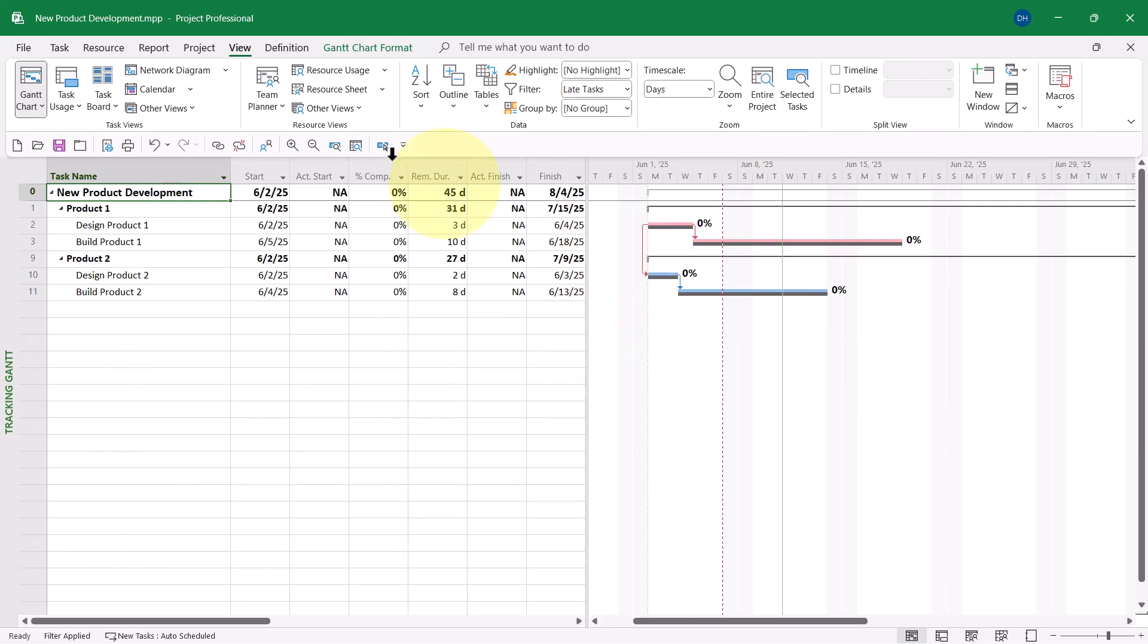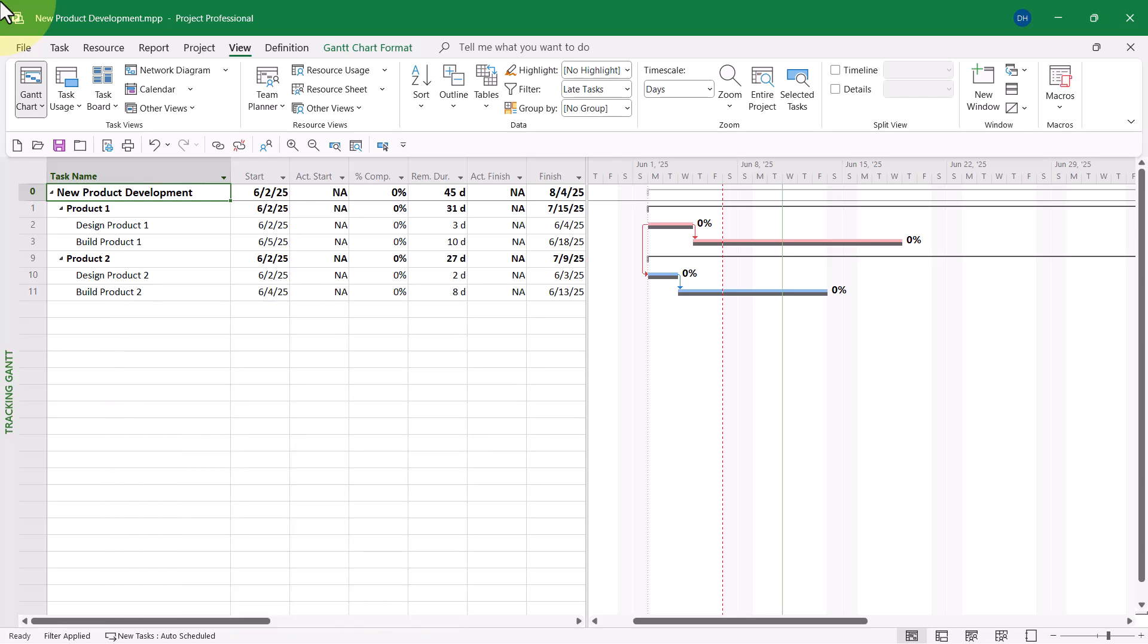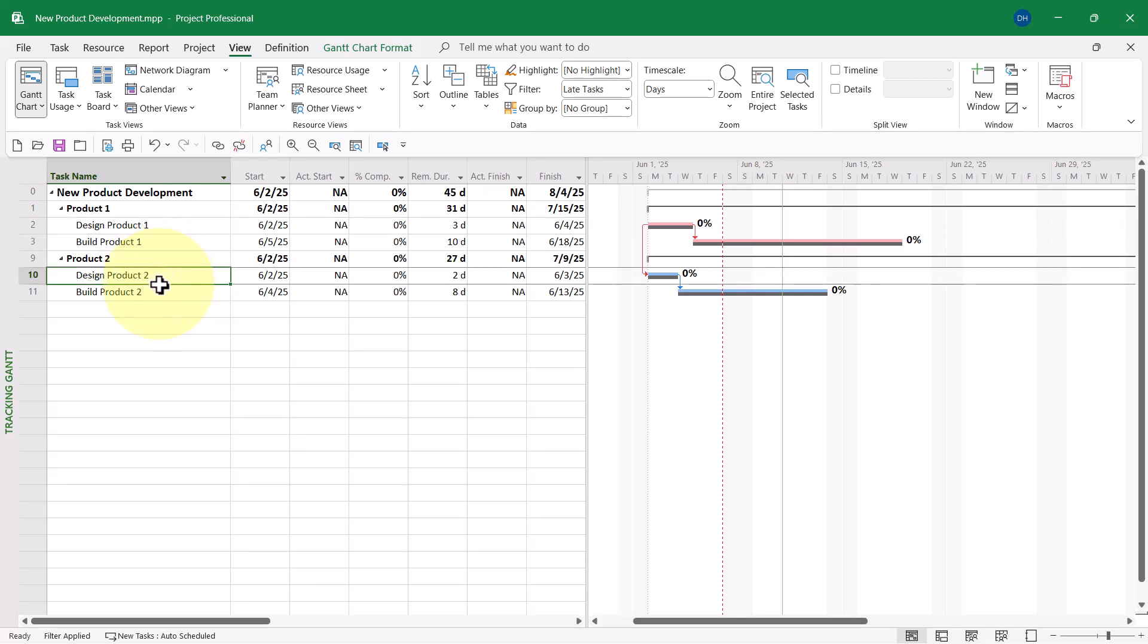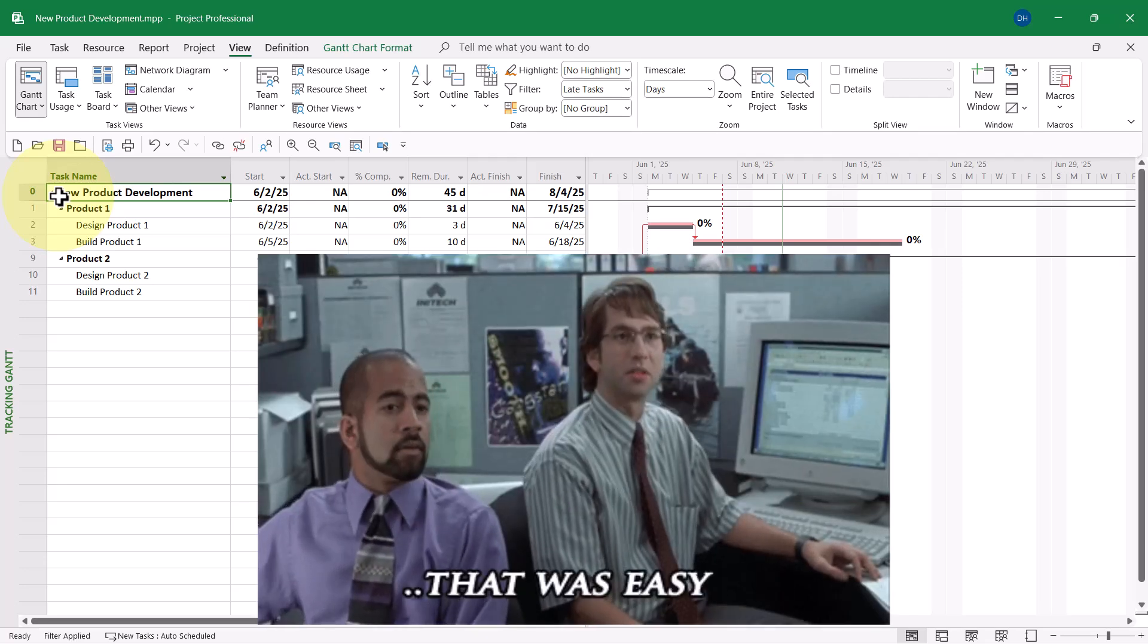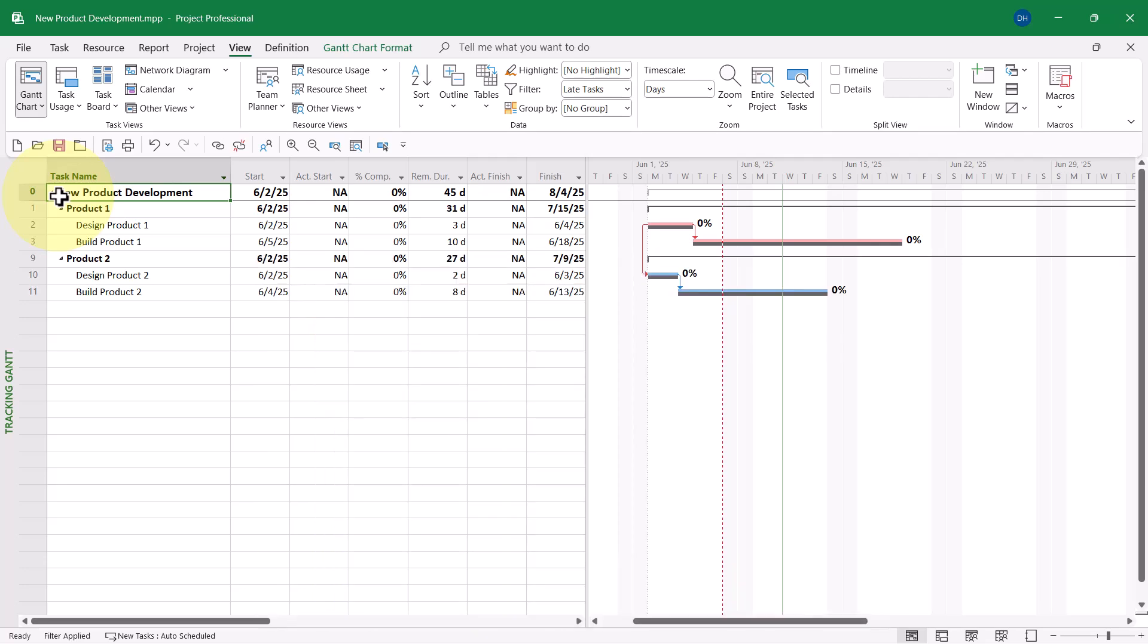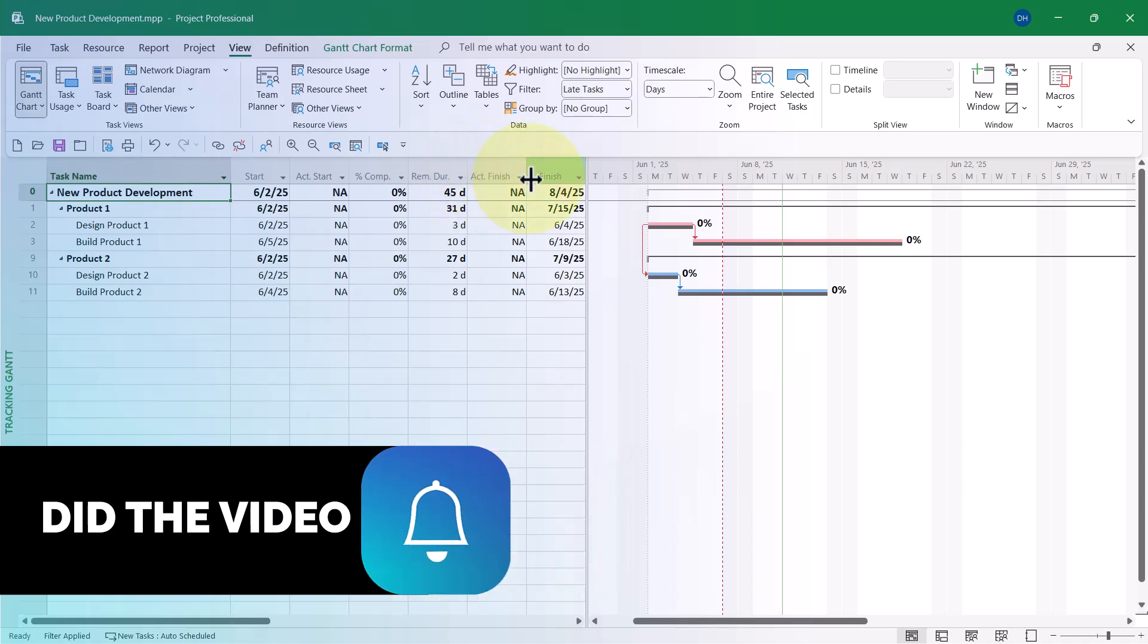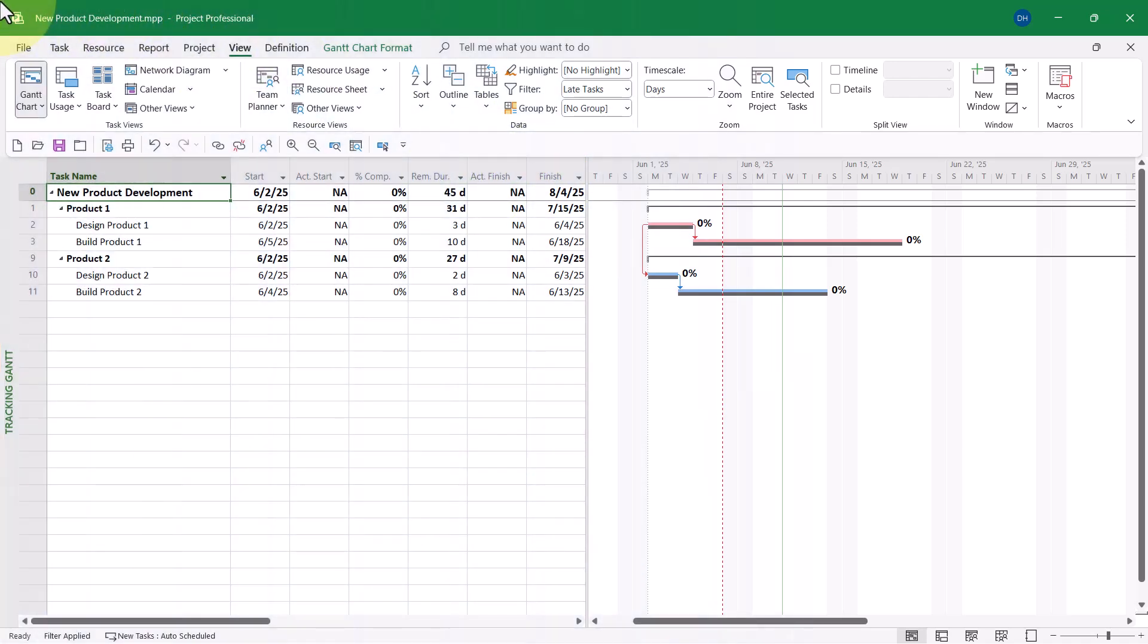When you apply the Late Tasks filter, Microsoft Project will automatically show you every task that needs progress entered from last week's reporting period. You can see that tasks 2 and 3 and 10 and 11 all need progress entered for them. So once you've done that, it makes it really easy to manually enter task progress using this customized task table on the left side of the tracking Gantt view.